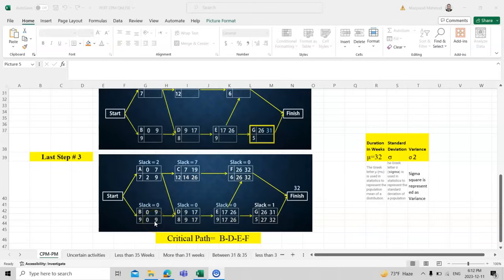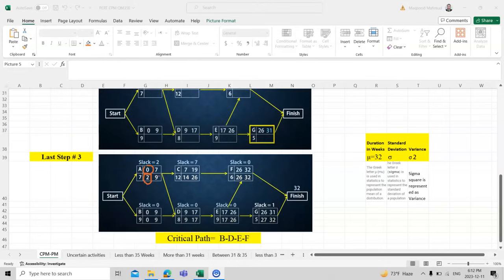For Task B there is no contest, so LF = 9 automatically. Using the difference between LS and ES (or LF and EF), we calculate the slack value. For example, LS − ES: 2 − 0 = 2, and 9 − 7 = 2. For Task C: 14 − 7 = 7 and 26 − 19 = 7. This matching value is like a magic check — if both differences don't match, there is an error in your chart. We are interested in tasks where the slack is zero.